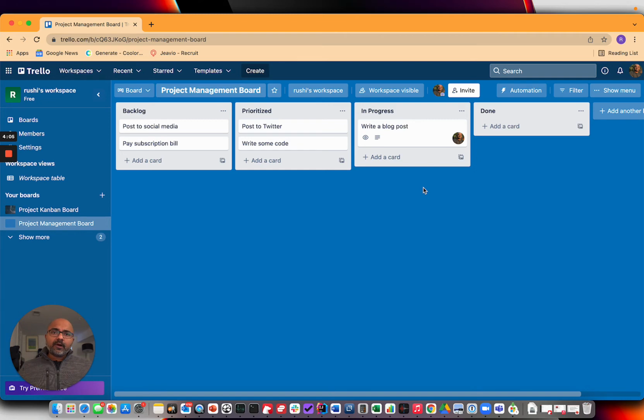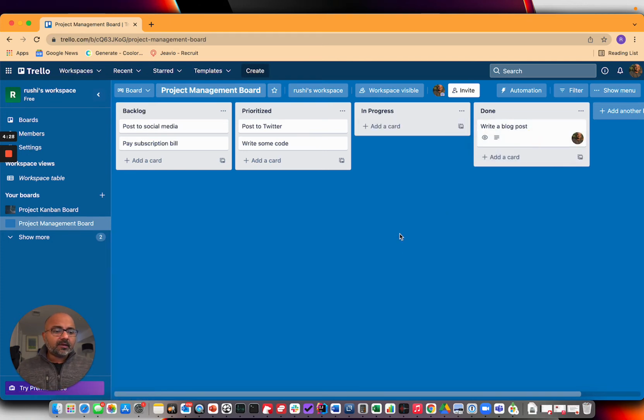So we want to avoid the situation where you have one person who has 3 or 4 different things that they're doing. In my experience, the best way of moving forward is to make sure that each person has one item associated with them. Now, when you finish the task, whoever has been associated with the item moves it to the done column. Okay.